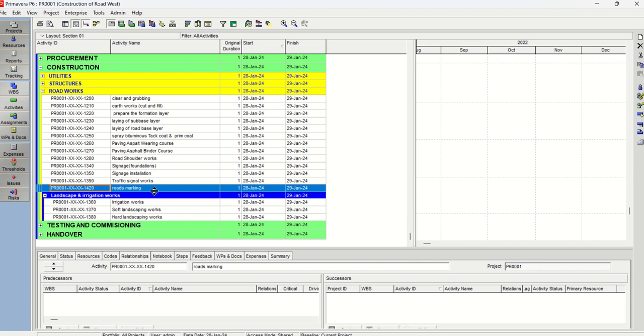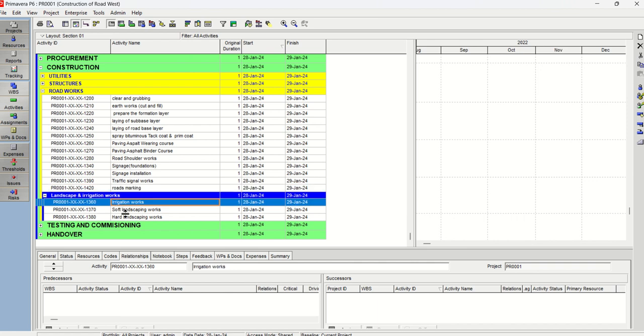All right, and similarly you can repeat this process and go through these activities as many times as you want. The first step would be to get this high level activity list cleared and put these into the right WBS levels, and then you can add the next level of your WBS structure. That will be the easiest way for you to do that.